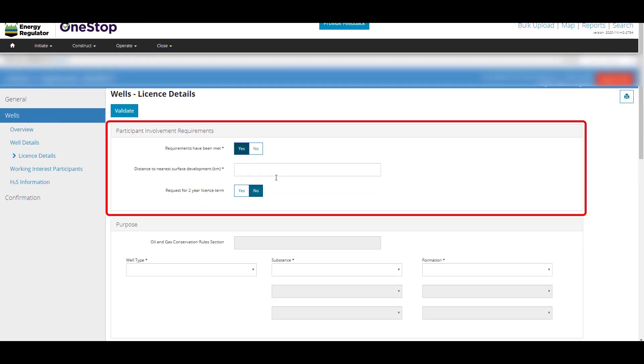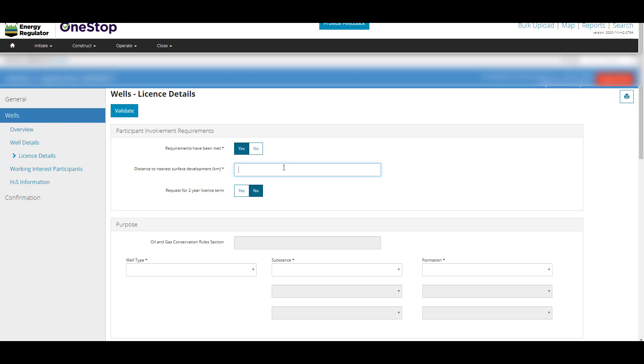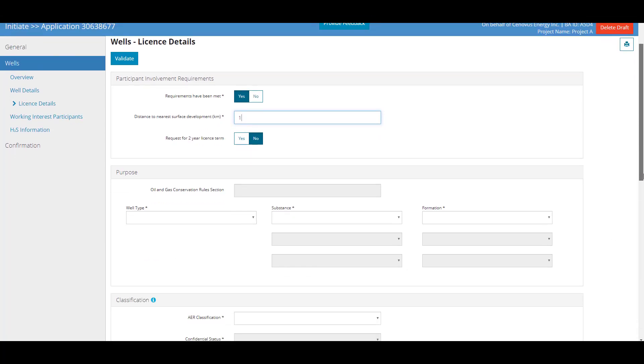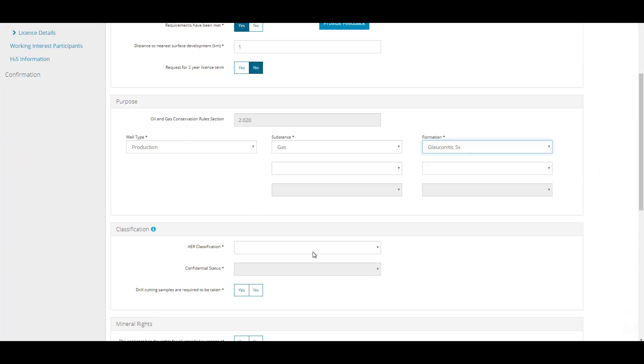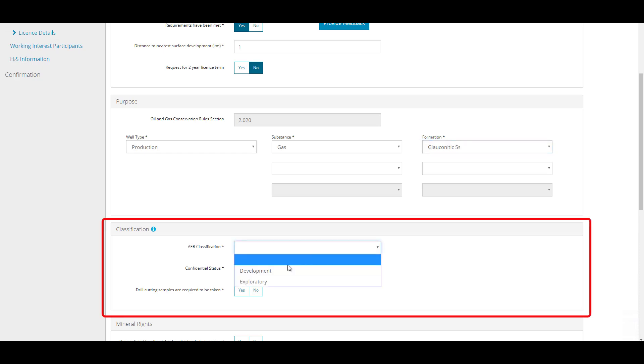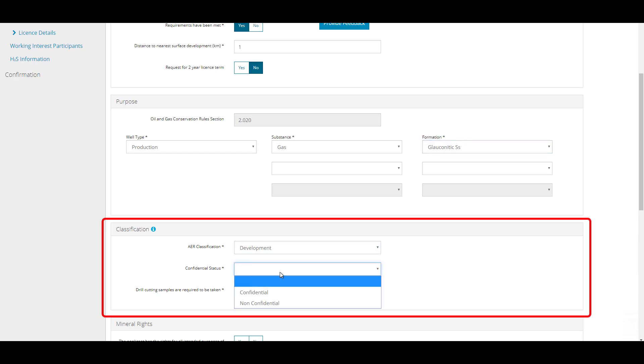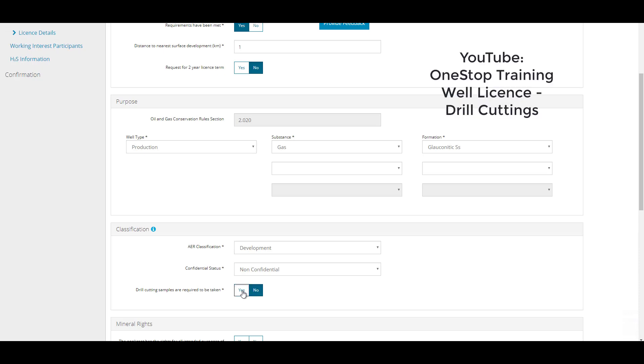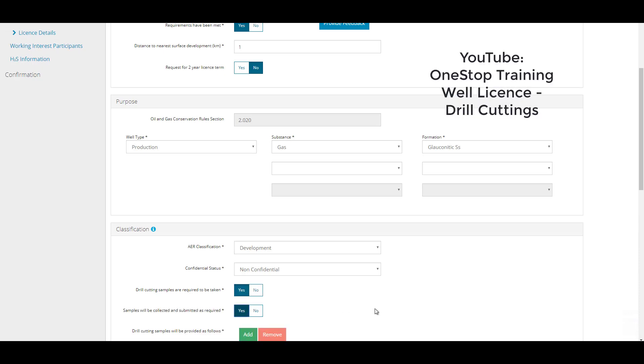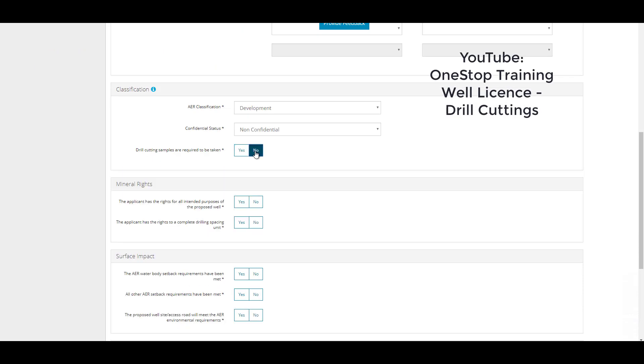Complete the Participant Involvement Requirements section with all required information and attachments. If a two-year license term is requested, a commitment pop-up will appear that you must agree to. Complete the Purpose section with all required information. In the Classification section, enter all information for the proposed well classification, confidential status and drill cuttings. For more information on drill cuttings, please search our YouTube channel for the video on OneStop training, well-licensed drill cuttings.